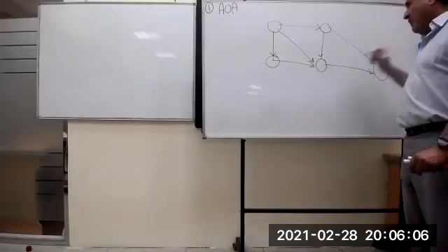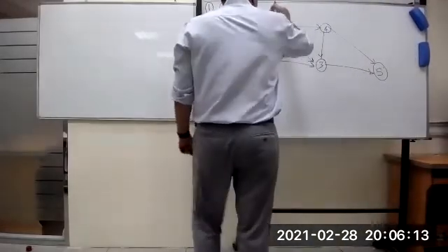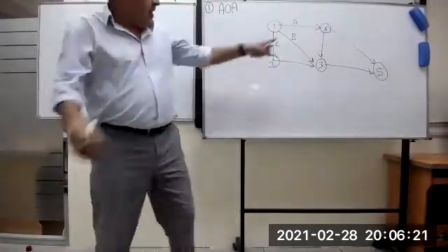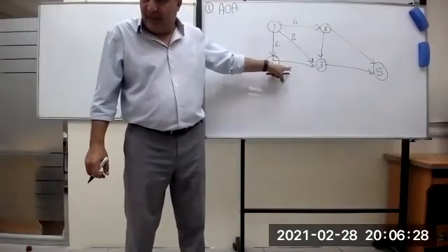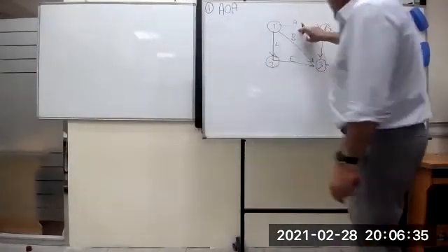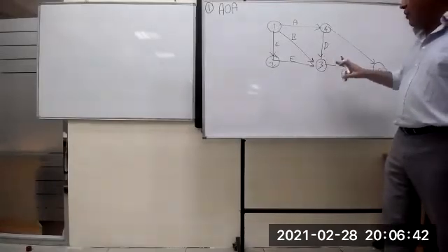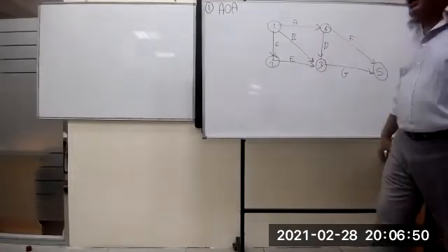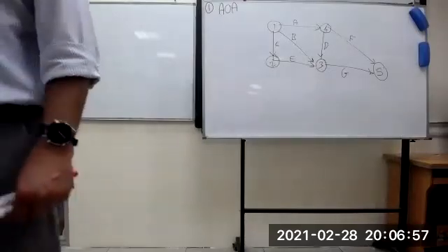If this is the last, whatever. 1, 2, 3, 4, 5, 5, 4, 3, 2, 1. Activity, this is a start. Activities A, B, C start from one point. Does C have a successor or not? C has E. Does A have a successor? Yes, D. How many predecessors does G have? B, E and D, correct? And F here is not having any relations, right? Open end. We call it an open end.